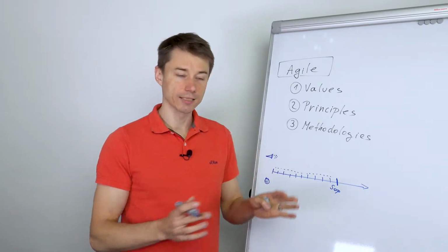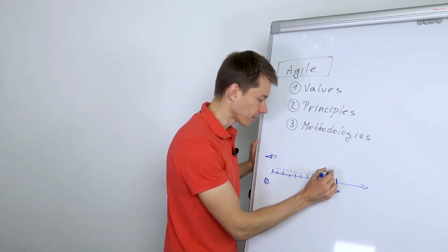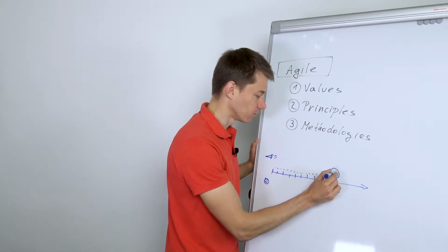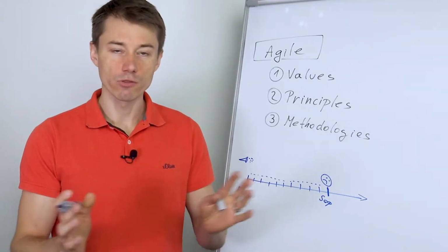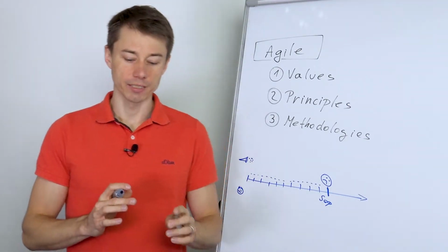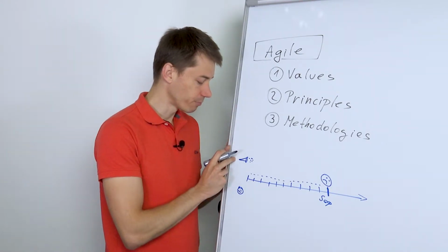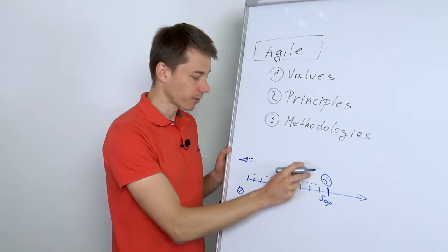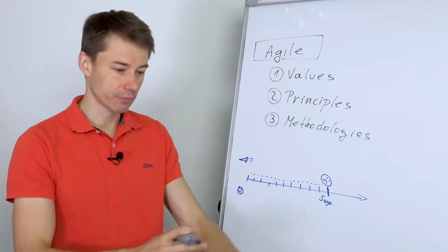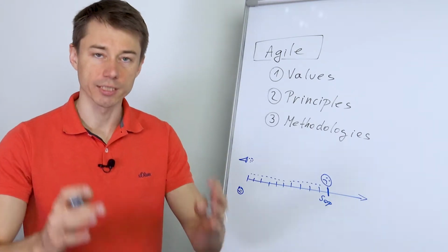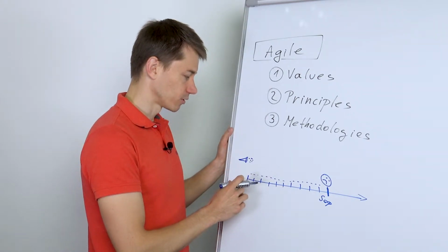Jokes aside, say we hit the deadline, we release it, and we wait for the feedback, and the customer says, oh, well, not really. This is not what I wanted. This is not what I expected. It's a bit different. So from the business standpoint, you spend 9 months building something without having any indication from the customers if what you are building is what they want. Not a good point to be at, right?